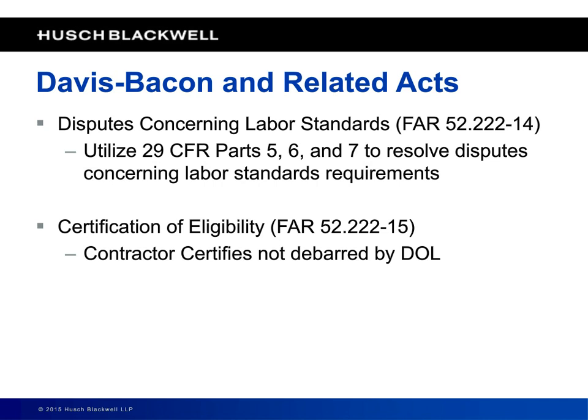Sometimes you'll have issues where a contractor believes there should be additional classifications of workers established under a wage determination, maybe a laborer standard or a journeyman standard for a different trade that's not listed on the wage determination. There is a process in the Department of Labor's rules for bringing that to DOL's attention and getting a DOL determination that may result in a revision of your wage determination.